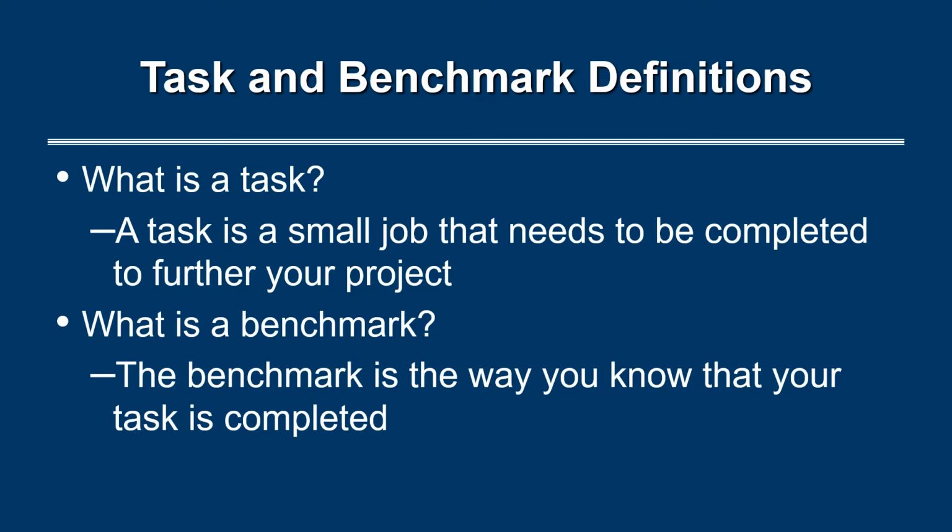One task may be to develop a toolkit for the people you are training. The benchmark for this would be the completion of the toolkit. Another task may be to create presentation slides for the training. The benchmark would be completion of the slides.